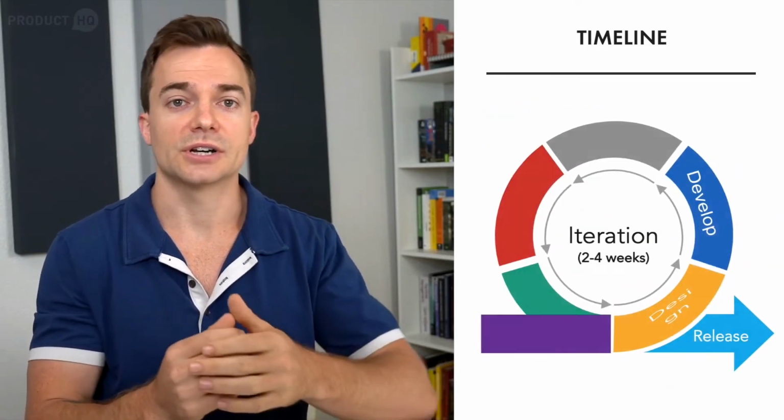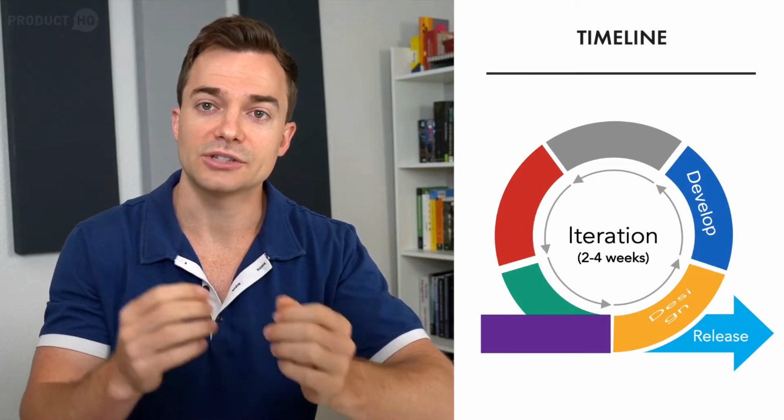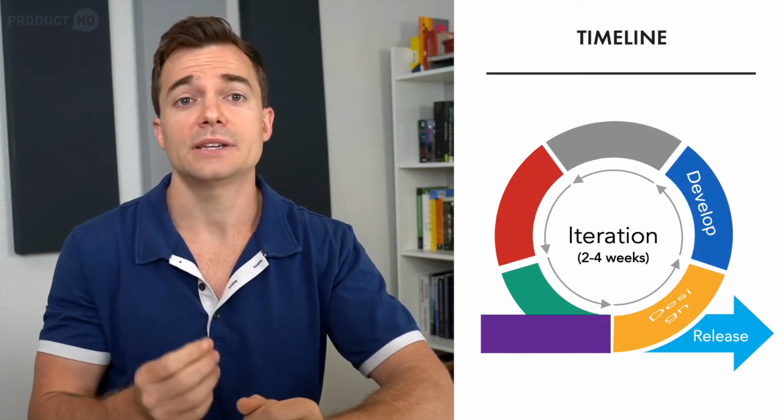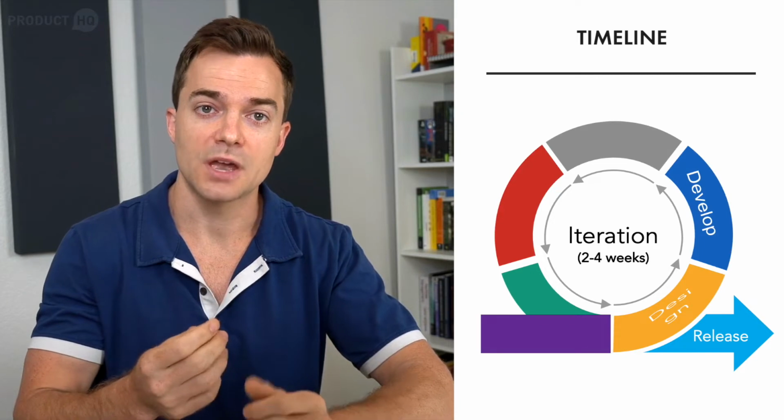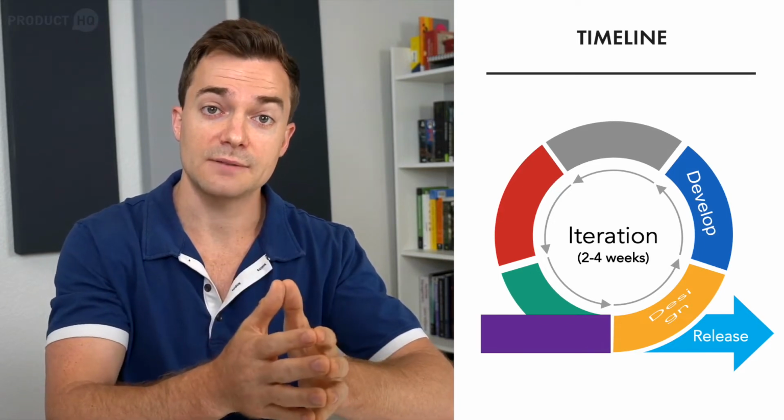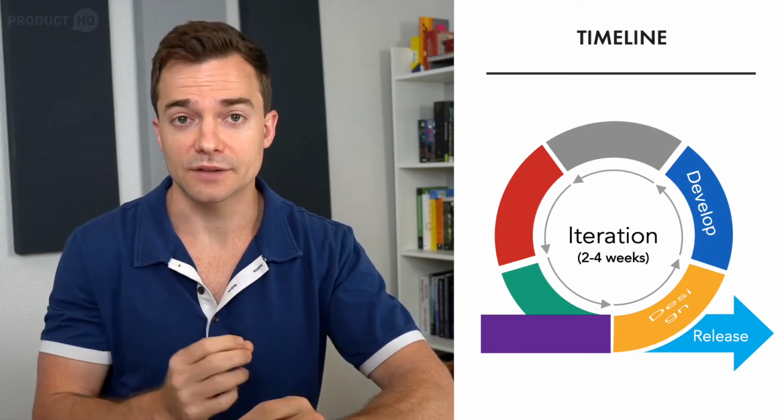In contrast here, Agile prioritizes incremental adaptation, and the timeline depends on consistent progression. Rather than delivering the product at the very end, Agile makes use of frequent deliverables on a weekly or monthly basis. And difference number two is flexibility.